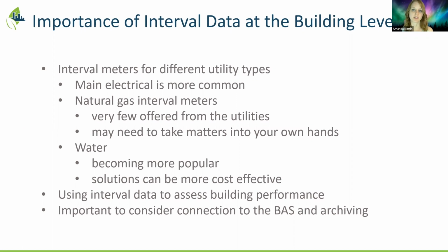During the pandemic, when we were trying to partially or fully close facilities, we were tracking loads and performance using those meters as well. On large projects, usually if the savings is over $10,000, we would put in a meter so we could use it for measurement and verification purposes. Ideally we get it in at least a year before the project takes place, so we can track the baseline pre and post after the retrofit is completed.